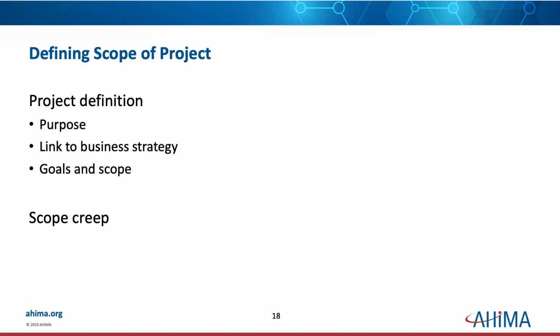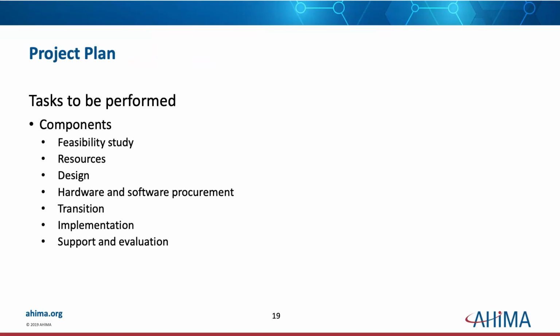Does it need to grow? Or is this, gee, I wish it would grow because I need this extra piece or part that's not really in the budget, but we really need it, or we need this interface and we didn't originally anticipate it, but that's another $20,000, and you have to watch out for that. Because it's too easy to blink and all of a sudden you've spent $2 or $3 million more than what is in your budget, or you committed to it.